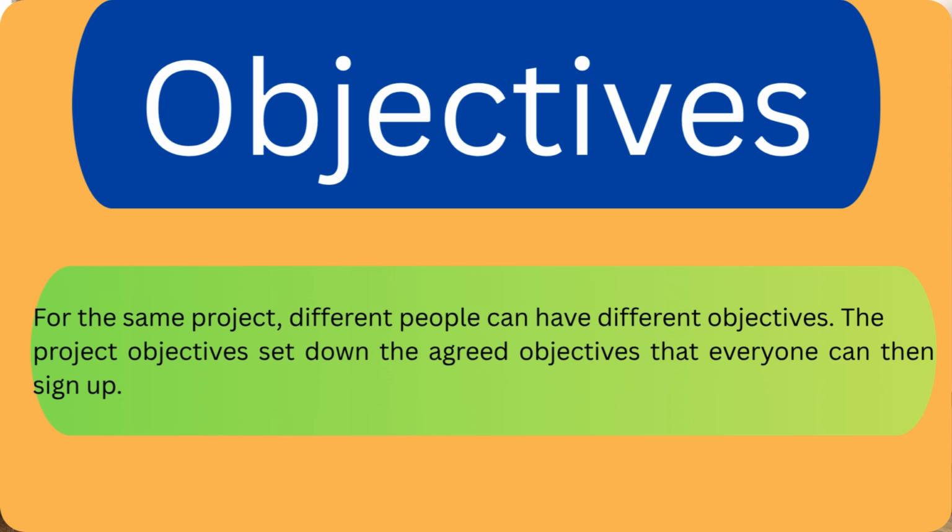So in the project objectives, it must be very clear in terms of how each of the 6 control factors, time, cost, quality, scope, and risk and benefits, are also going to be measured and controlled. You may find that a bit limiting, but you can always add objectives that don't fit easily into these categories, and it will be better.